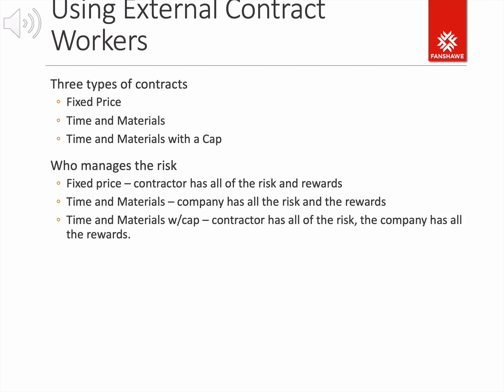They're going to have to absorb that cost. It's their loss. But if they can produce it for $1,000, we still have to pay $8,500. It's fixed price. So the nice thing about fixed price is we as a customer don't share in any of the risk. Our obligation is financially stated up front. It's a contractual obligation, and we will pay no more or no less for that item.